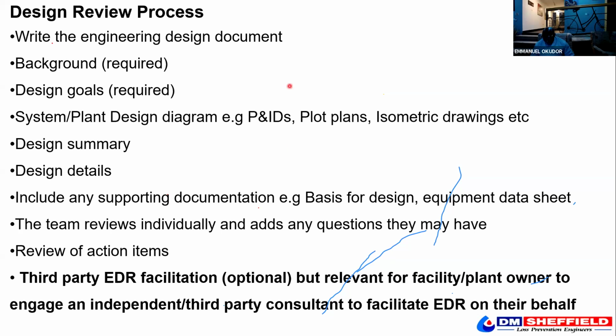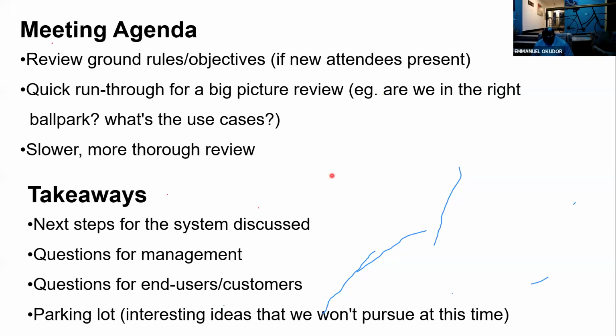So it's very important you bring in a third party that is independent. He doesn't have to participate in the design. What you do is just give him all the necessary drawings and documentation. He looks through with his own team, then he comes back and we have this workshop.